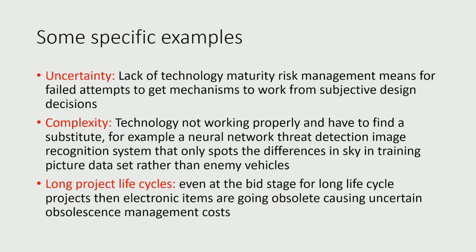And with these long project life cycles, sometimes at the bid stage of aircraft, they're finishing the design and lots of the electronics has gone obsolete in the design. They're no longer available from the manufacturer. So they have really difficult obsolescence management problems. So you have to manage obsolescence.